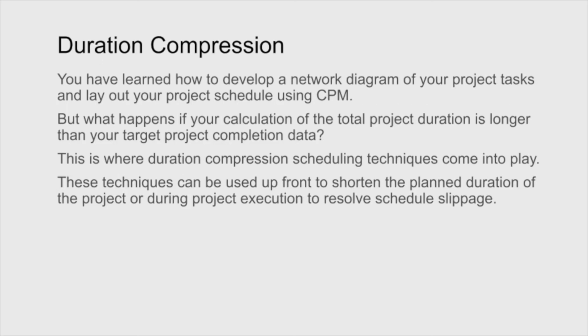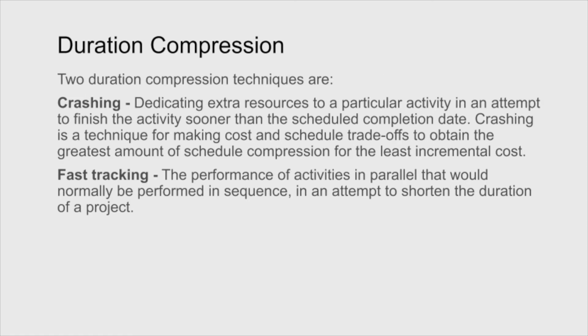We have to ask ourselves then, what happens if you calculate this and you realize, oops, it's going to take longer than what we had scheduled for the project. So there's a number of duration compression scheduling techniques that can come into play here that can speed the project up. These techniques can be used up front to shorten the planning duration of the project, or during the project execution to resolve some schedule slippage. So 2 major things to talk about with regards to duration compression.